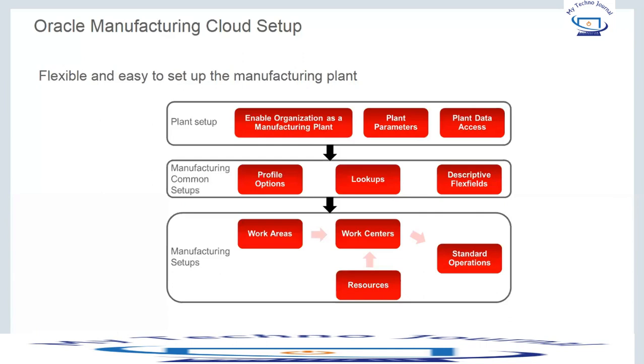So in spite of defining such operations again and again for utilization in different work definitions, we can define a template of operations which we can name as standard operations, and then utilize or leverage these standard operations in any work definitions wherever we see that the same kind of resources for the same duration are used to perform an activity. So for that you can define standard operations and utilize them.